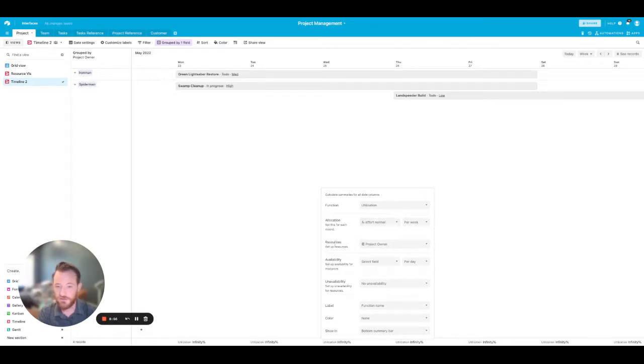And then we need to know, well, what are our resources? And our resources in this case are the project owners. Okay, they're the people. And the availability for the people is that weekly capacity that we looked up in that table. If you'll remember, we have that weekly capacity.